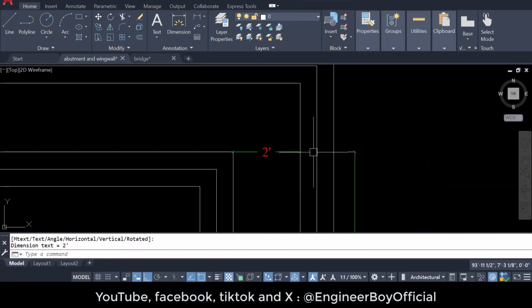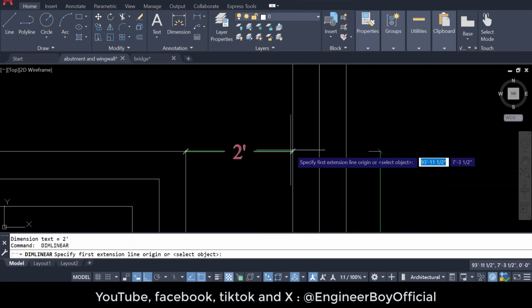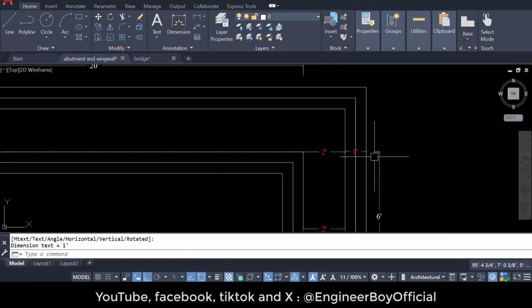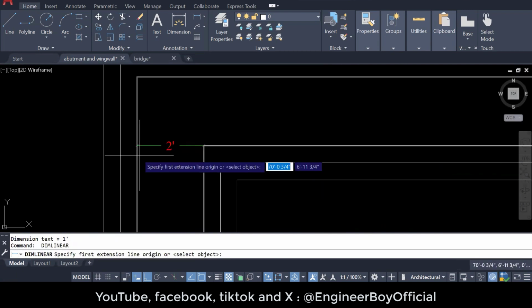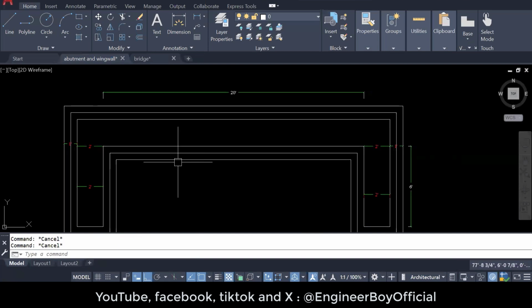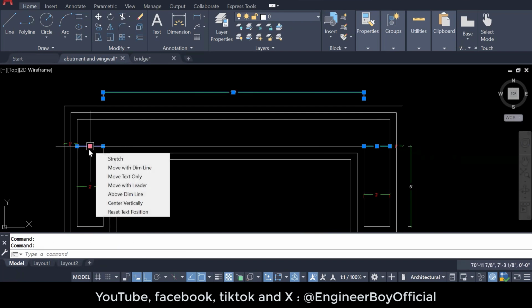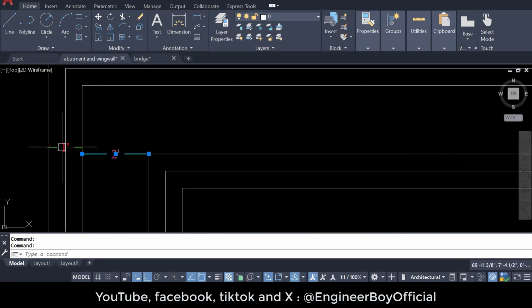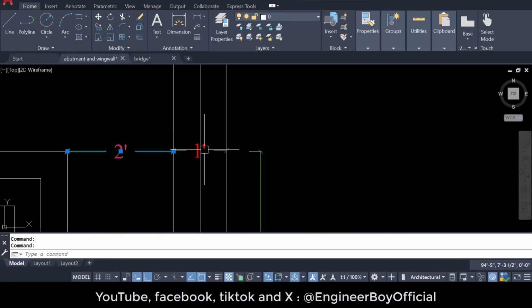Next, I'm gonna add these 2 steps, which are actually 1 feet, it means 6 inches one step and 6 inches another step. And to the other side, which is also 1 feet, it means 6 inches for one step and 6 for another step. Now the total is 20, and 2 for another side, and 2 for this side, which means 24, 1 feet this one, 25, and 1 feet this one, which is 26. What do you guys say?